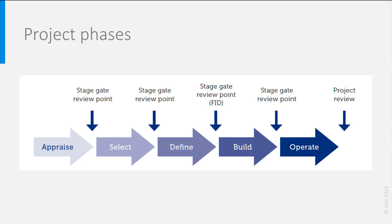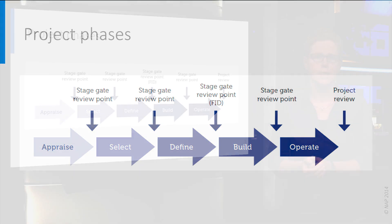Only after a positive investment decision, the building phase can be entered — this is phase 4. And then in phase 5, the project is handed over to the client. Between these phases, stage gates are defined. And at these stage gates, project reviews take place, and it is decided whether or not the project can enter the next phase.